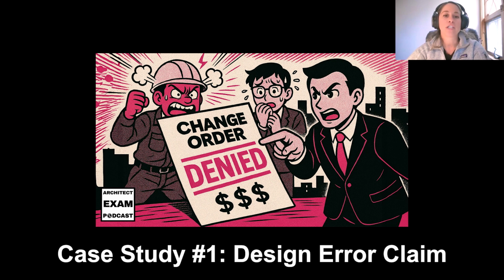So first, project level negotiations, again, they were unsuccessful. Then there must be an executive level meeting between all the parties involved. When that doesn't resolve things, they will schedule a mediation with an industry expert and bring in an independent estimator for a detailed cost analysis.